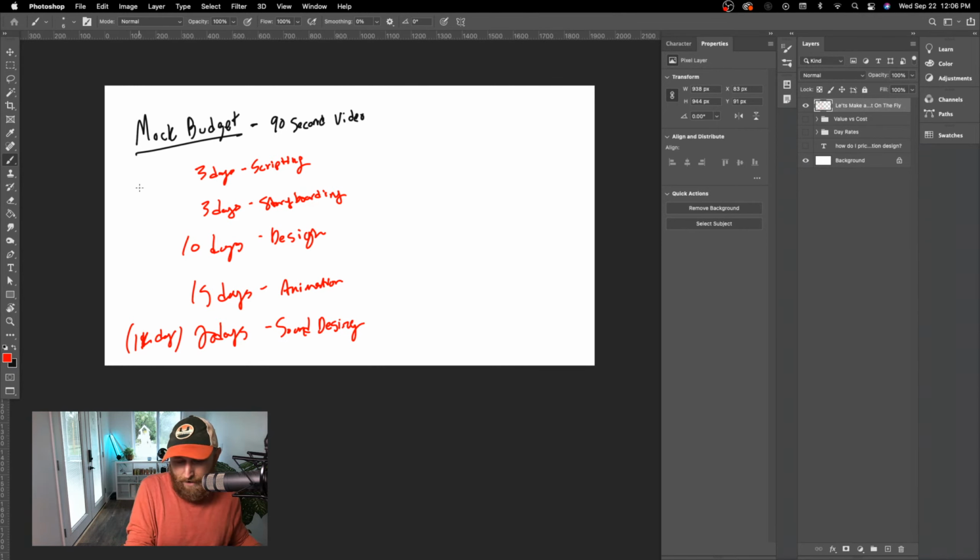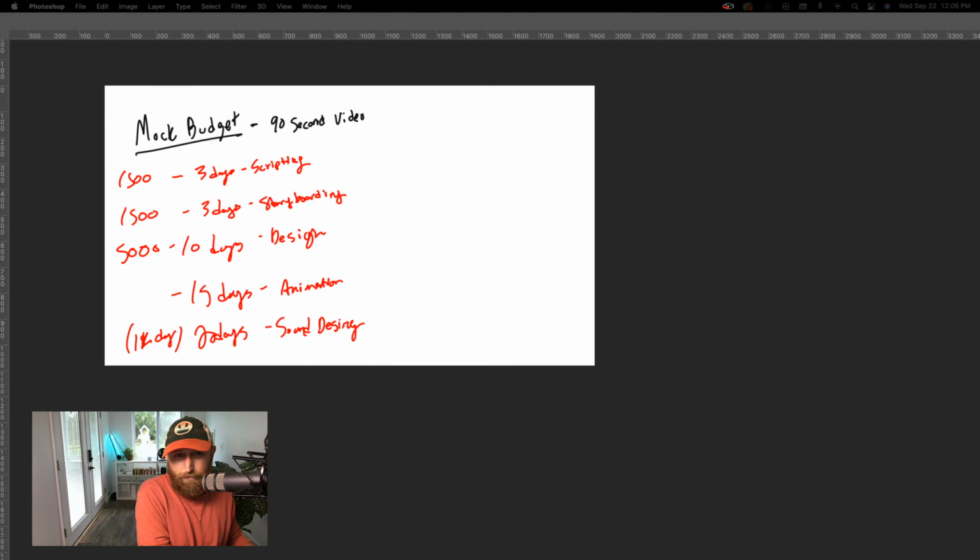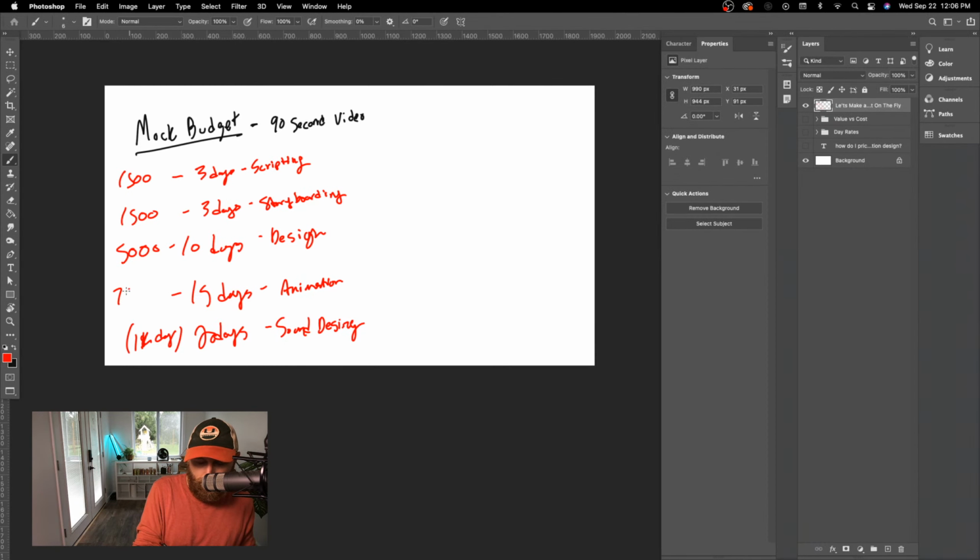But also we're going to start to be able to get some numbers here. So I know if my day rate's $500, basically I'm asking for $1,500 for this portion. Here, I'm asking for $5,000 for all the design assets, and then 15 times 500 should be $7,500. But I will quickly bring up a calculator as we get into some of this math here. So I'm looking for $7,500 here, and we need $2,000 for the sound designer there.